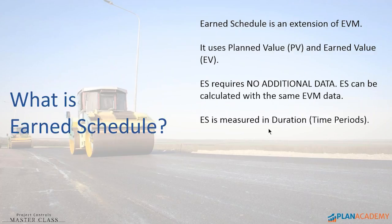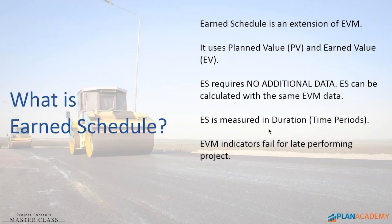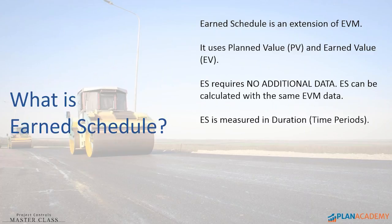One of the great things about Earned Schedule is that the values — the indicators — are measured in terms of duration. So you can get answers like: Earned Schedule is 10 weeks, or your estimate to completion is 12 weeks or 12 months, depending on whatever time period you're using. So that helps us understand better what the projected finish is going to look like.